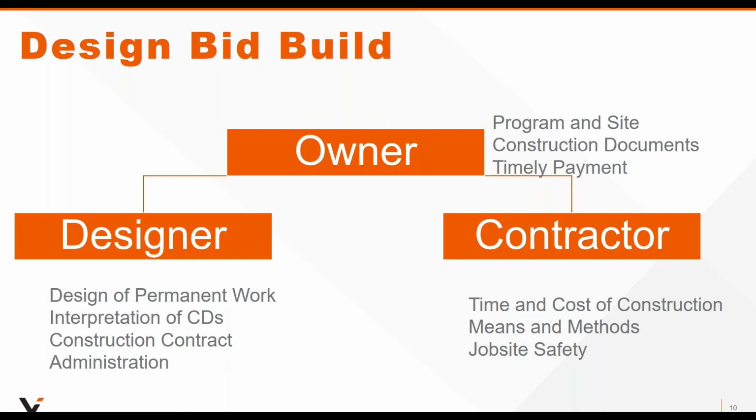If indeed there isn't enough information or there is insufficient information, then any additional costs that the contractor has to pay out is the owner's responsibility.